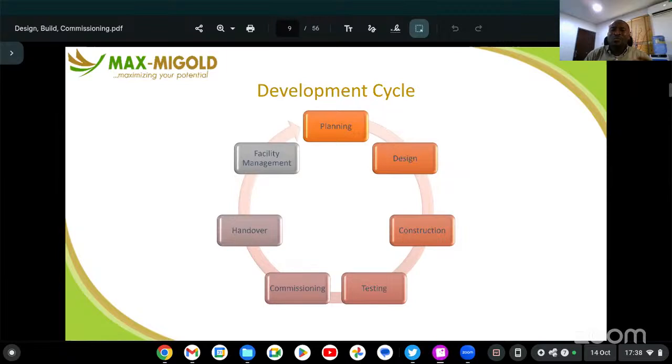And at times we see that this training is done virtually, but most times they come into the plant to do in-person training. Documents are submitted as per the training manual and the operations manual. So all these are things that need to be done during handover. Proper training should be done. Operational level of expertise should be imparted in a way that after the vendor leaves the site, the operators, those guys on site, will always be able to handle the particular system that has been installed.